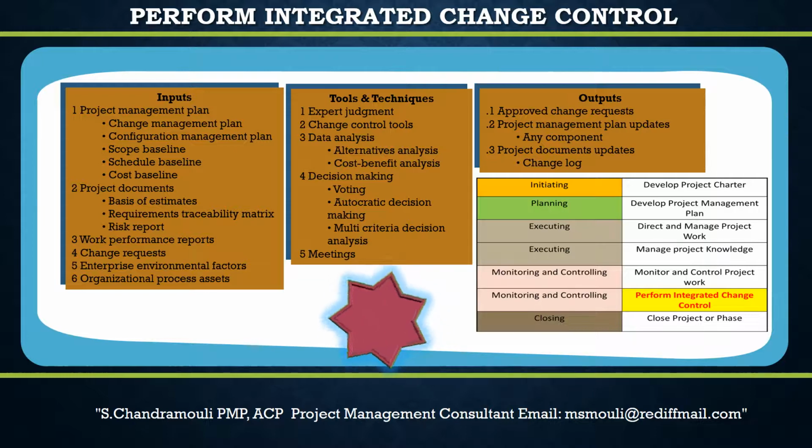The next input of Perform Integrated Change Control Process is the change requests. All of the monitoring and controlling processes, and many of the executing processes produce change requests as an output. Change requests may include corrective action, preventive action, and defect repairs.